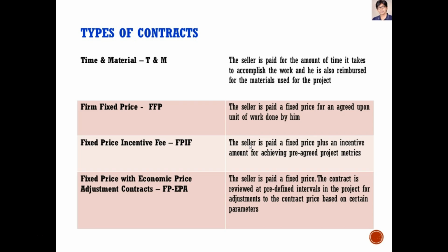The one exception to that is if we run into something called a change order, and we've talked about that a little bit. So if we require a change order, then that will change that contract at some point. So if we did a guaranteed maximum price to overhaul this building, and then we run into something that is not in the contract, so maybe they have to put in additional structural steel, then that would be a change to that. So there is this fixed price incentive fee.